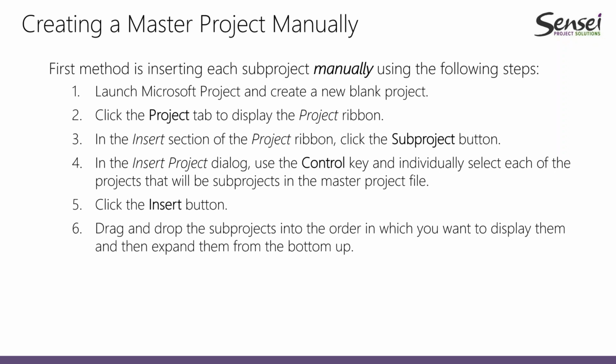Then the problems begin. The projects will not be listed in the order of display that you'd like to see them. So, ladies and gentlemen, you've got to drag and drop the projects into the order that you want to see them. And then finally, your last step is if you do want to make this a permanent master project, then you do save it.